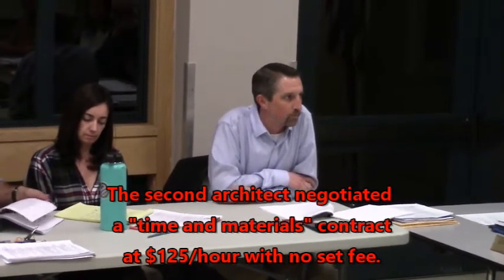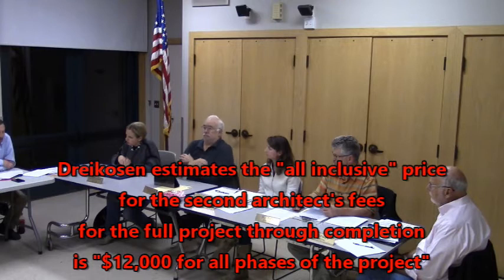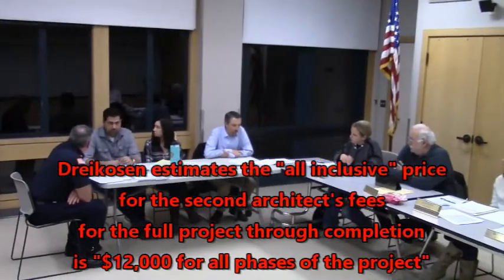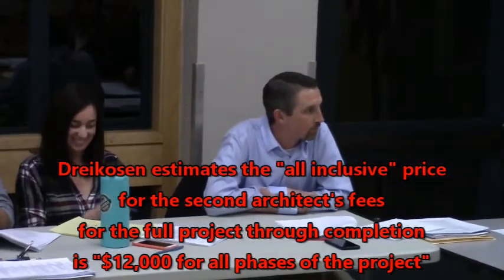Do you have an architect on top? I do. What's the cost of it? Well, it's a T&M, a time and materials agreement. In working some backwards math with them, while a lot of it is very hard, it's not any sort of flat numbers, and none of the people were really able to go on flat numbers, we're looking at an overall scope of architect services, estimated at this point in time somewhere around $12,000. That includes all phases.